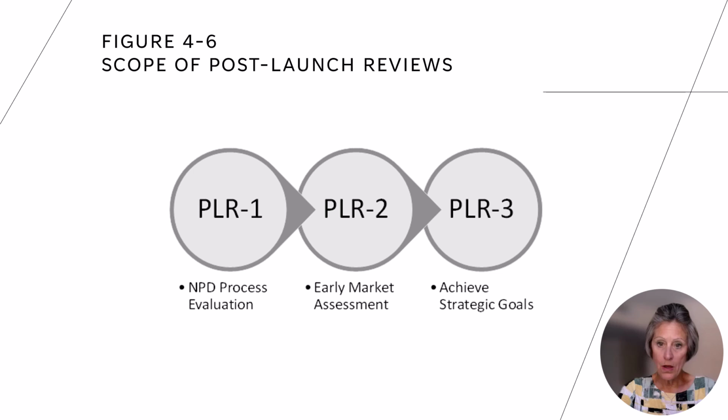Does the new product offer a competitive advantage? Is the project technically feasible? Do we need to acquire technology, resources, or equipment to complete the product development work? Does the product leverage core competencies? Does the project balance risk, reward, and investment? Are there any special health, environmental, or safety considerations? What is the outlook for regulatory or legislative actions impacting the market or product technology?